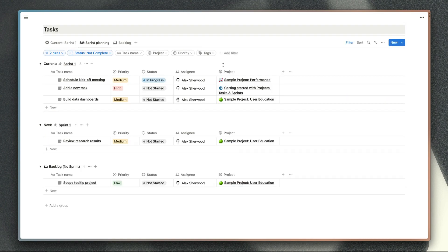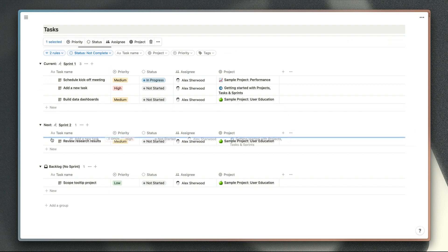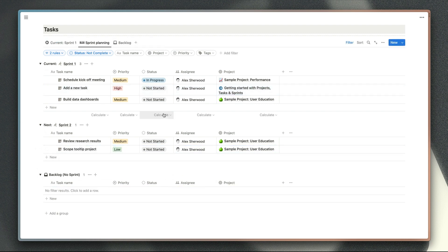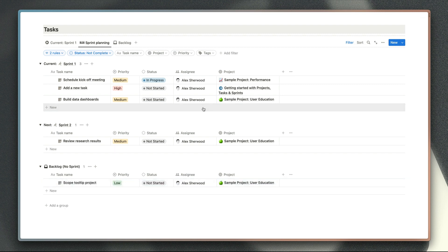I'm just going to undo that change now that you've seen how that functionality works to keep things simple. The next view to look at is this sprint planning view, which gives you easy access to all of your tasks — whether they're in the current sprint and just need to be dragged to the next sprint, or in the backlog and you want to add them to the next sprint to schedule them. Before this was an option, I used to have to set up pages with different linked database views to display our backlog and then drag pages into the swim lane for the next sprint, which was a much more clunky process — so I really appreciate Notion adding this functionality.